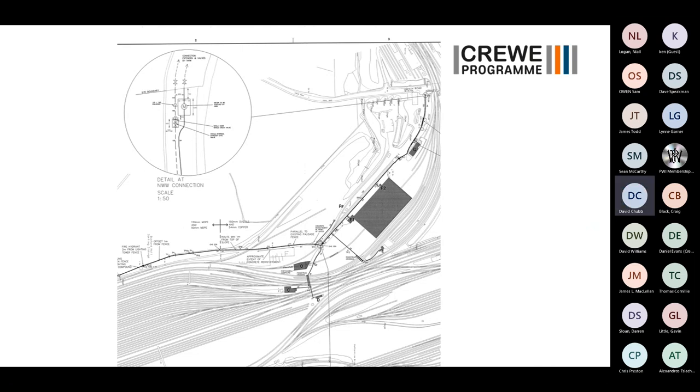So we haven't solved those problems yet, but predominantly the idea at the moment, because we're going to have to go through them and under the gas main at depth, is that it's going to have to be cut and cover. It's going to take a lot of time, because we are too close to directionally drill or to bore, micro tunneling underneath, all those fun things. We're too close. No tunneling contractor is going to take us on because they can't be certain they're not going to puncture the gas main, basically. Entirely fair, but a lovely headache when you finally discover it's there.